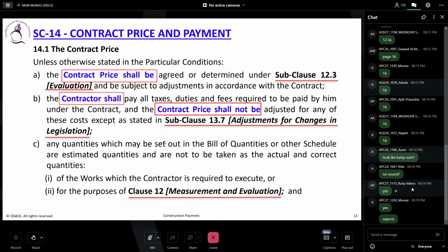Now the problematic one, we will discuss this subclause in a different area, but look at 4.1: the nature of the site, hydrological and climatic conditions, the extent and nature of the work and goods necessary, laws, and E talks about contractor agreement for access, accommodation, facilities, personnel.